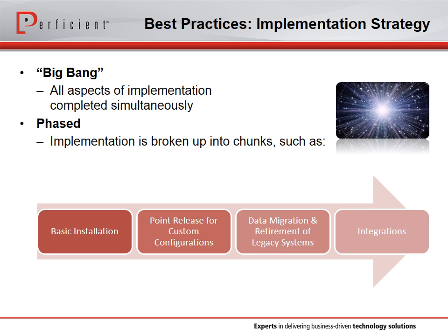But since data integration and other components are dependent on the base application functionality, it ended up being like trying to hit a moving target in completing those aspects of the project. So it can lead to multiple iterations.